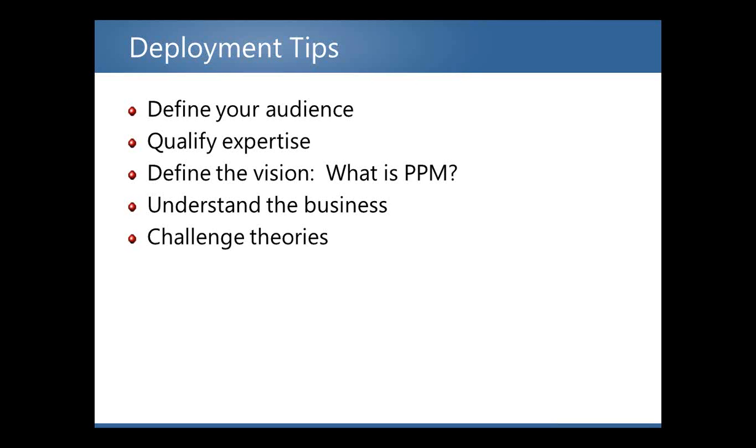If any assumptions are being made in the session, challenge them. Look for words such as "I think" or "it's possible." If there are parts of the business that are unknown, someone must be missing from your session. Make sure you lead with a complete understanding of the business. Challenging your team on the thought process will only lead to good things: innovation, new insights, and potentially new value.